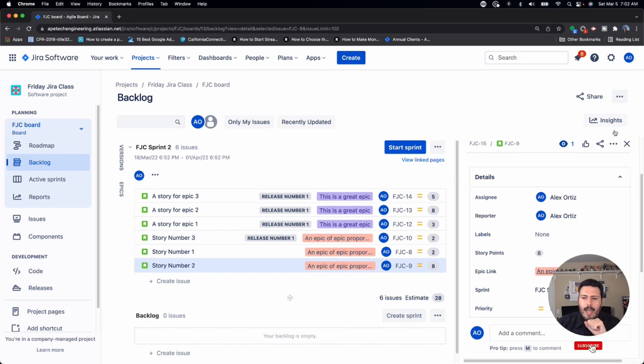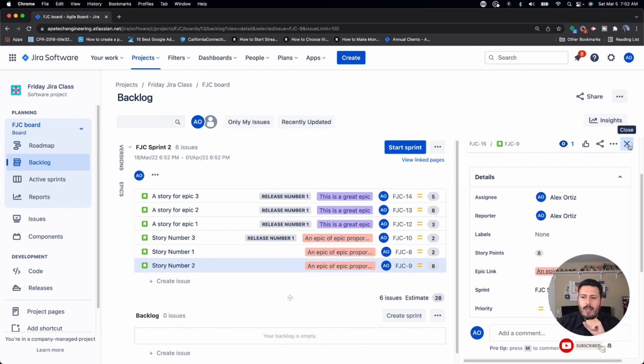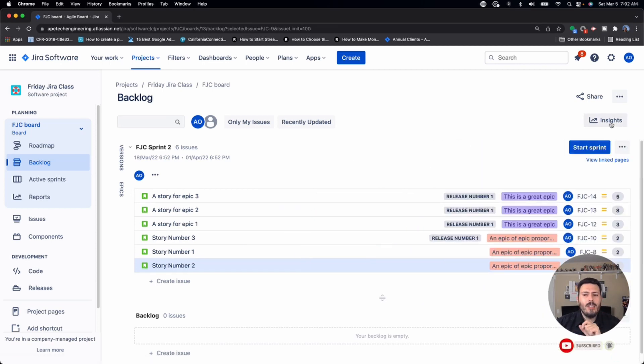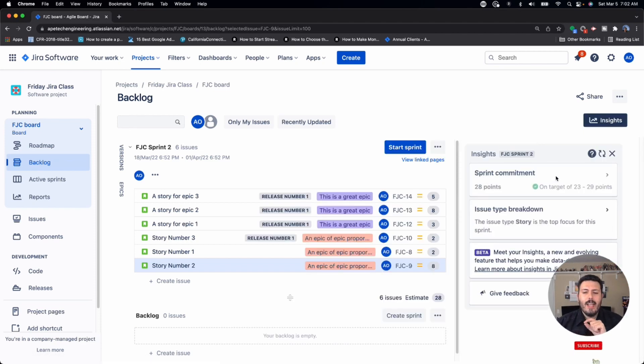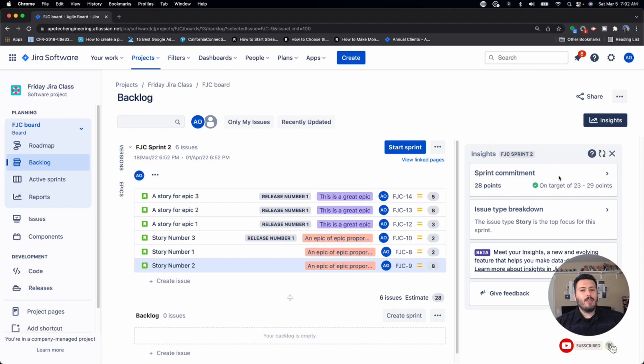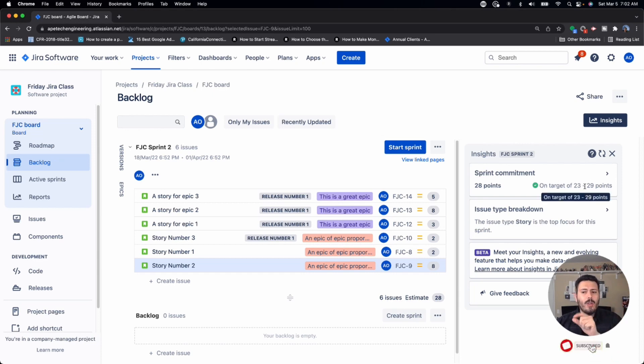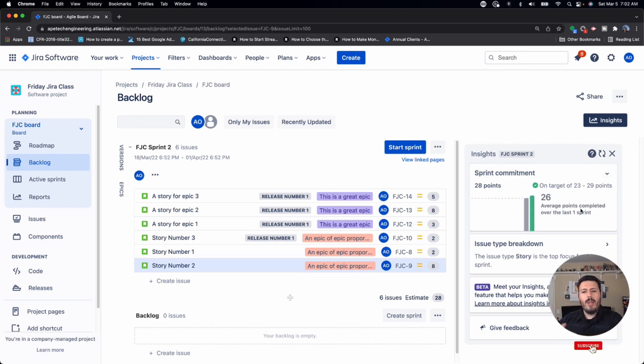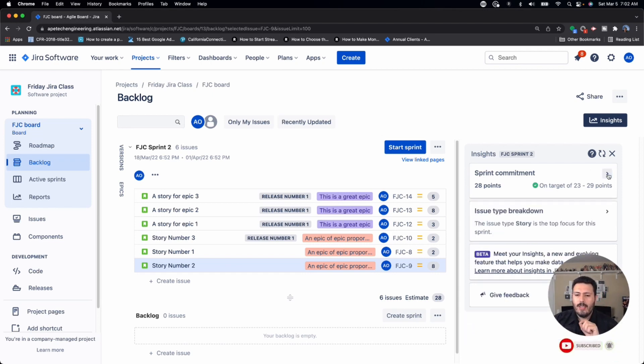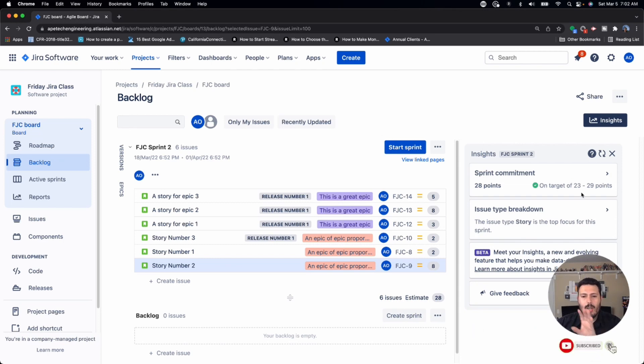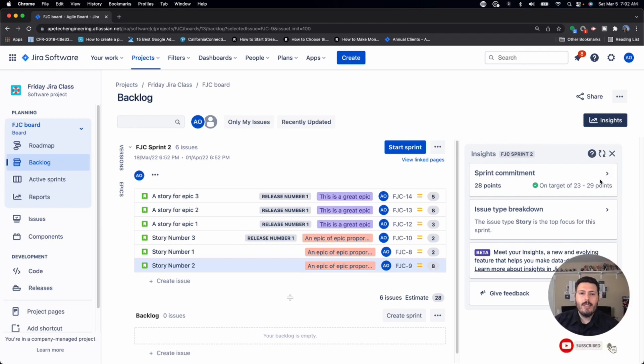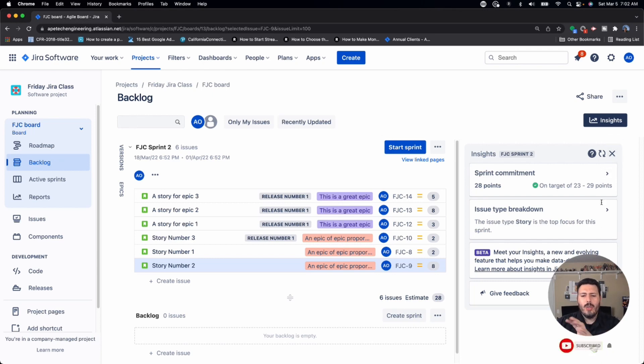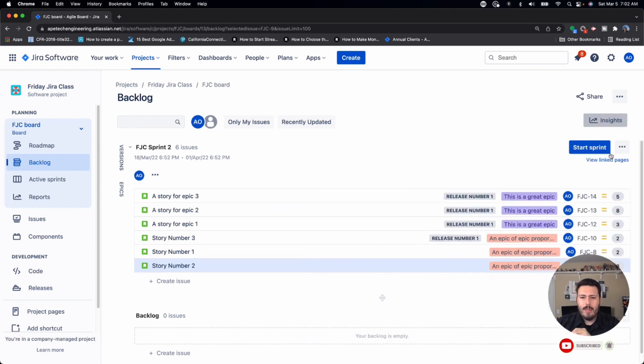One other little thing that I want to highlight before I close this video out is Jira has introduced this new thing called an insight. And this insight, given your previous sprints commitments and what they've actually been able to do, Jira is going to know if you're on target. It's going to help guide you and say, over the last couple of sprints, you've been able to finish this amount of points. So you're either over, you're under, or you're just on target. So very Goldilocks with this issue here. Come and look at this because it's going to take the guesswork out of like, is my team appropriately tasked? Are we setting ourselves up for success or for failure? This insight here will be able to show you that. And if you want me to show you more on the insights, just let me know in the comment section below.